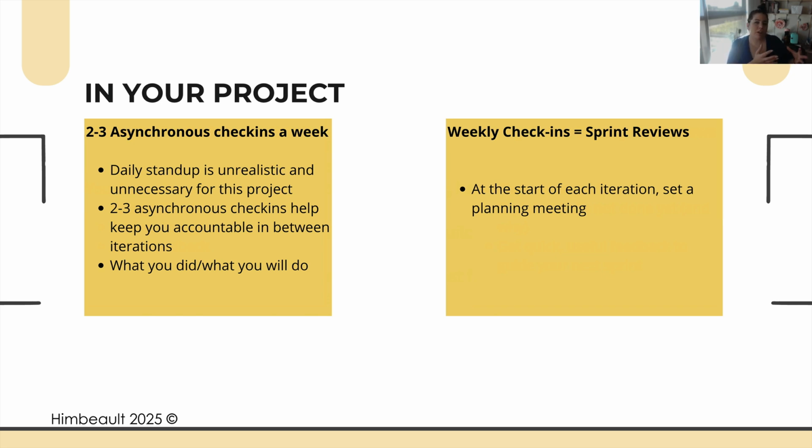So if you don't have a check-in structure in place yet, this should be your opportunity to reach out to your team and say, let's set up a check-in structure. And anybody on your team can reach out and say that. You don't need to be the unofficial team lead or anything like that. If you're on your team, you have a right to say, okay, I've watched the pre-class videos. There's a suggestion for asynchronous check-ins. Let's do them on Mondays and Thursdays. Whatever it might be, pick 2 days, and the expectation is every single person will write a message into your group chat saying what they've done since the last check-in and what they intend to do before the next check-in.